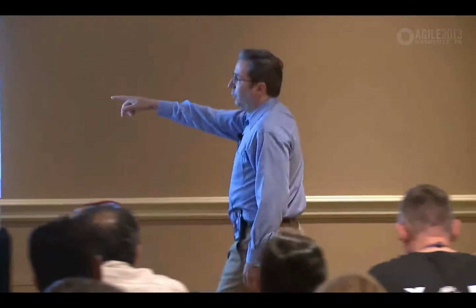Each team is building a component. We know at some point those components have to integrate to create the product that we want to deliver. Maybe there's even an integration team that tries to do this late. The problem is it's never really gone together that simply for me. Those Lego bricks just kind of snap together? It never has worked out all that well. So when we do this late, the only thing we don't know is how long we're going to need in the test and fix phase, when they don't actually integrate. Well, that's a rather bad time to learn that things don't integrate. So maybe we structured our system to learn a very important piece of information at the worst possible time we could ever learn it, late. Maybe we should have structured the teams differently.